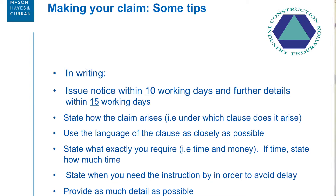Some practical tips for dealing with your 4.7 claims: make your claim in writing. An oral claim doesn't suffice, and trust me, they come up. I'm constantly told, 'but I said it to him' - it doesn't matter. It's not in writing, you haven't made a claim. Issue your notice within 10 working days.